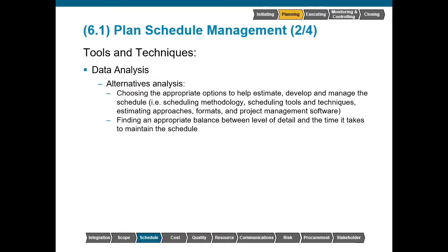If we have a schedule of several thousand activities, it could be prohibitively expensive in terms of effort and amount of time consumed trying to get granular levels of detail updated on a regular basis. Is it truly necessary to know if we are 47% completed a single activity, or can we simply say it started? It will depend on the specific needs of our stakeholders, what type of information they require, and at what frequency. However, we do have to take it into consideration now as we develop our plan, which we will be abiding by for the remainder of the project unless we decide to change it later through formal change control.